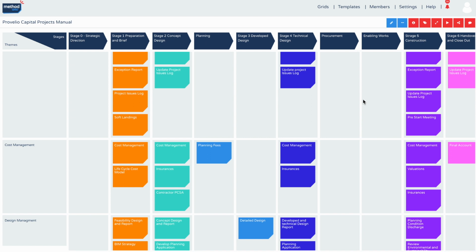Yeah, so what we do is use SurveyMonkey at each project stage, sending it out to the project managers and running them through a checklist of things we want them to remember or introduce into our knowledge management systems.